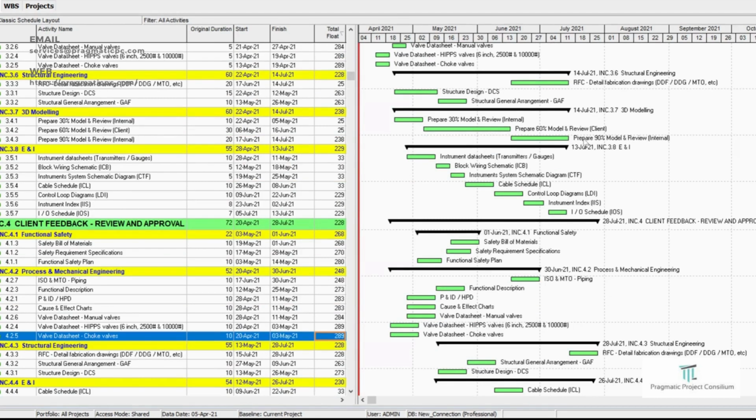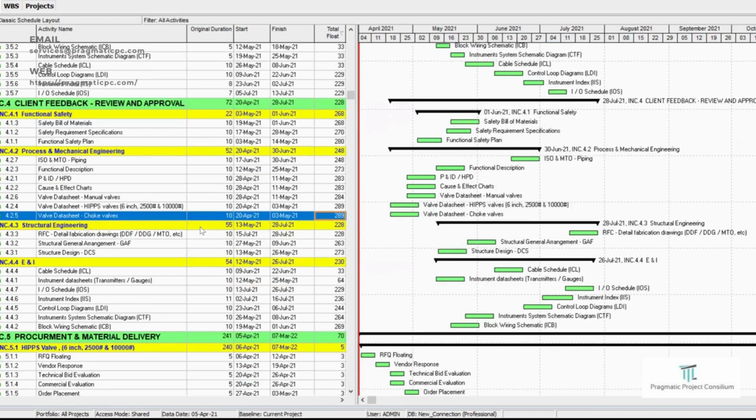By all means, while checking this program, it is very clearly understood that this schedule is not ready for the baseline. Therefore, a lot of corrective action is required to bring it back to baseline fixation. An activity experiences delay because it is not properly linked with others.